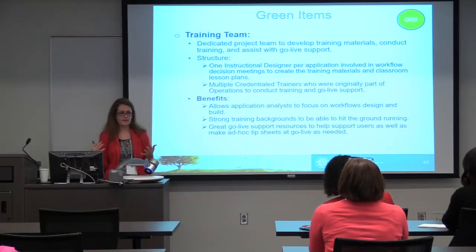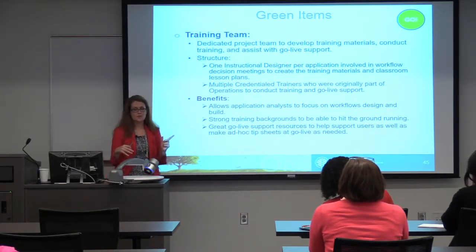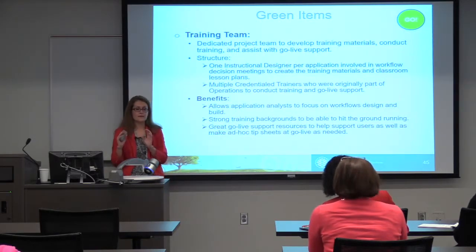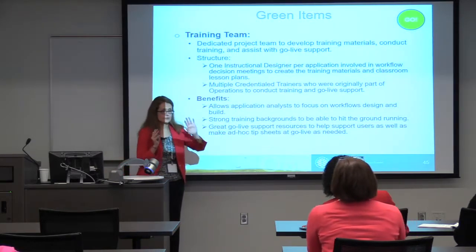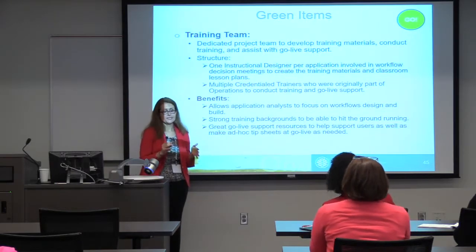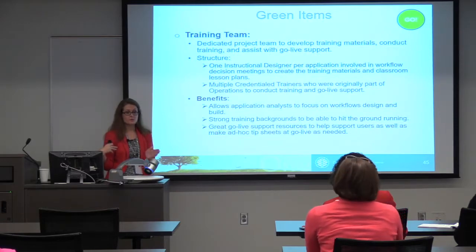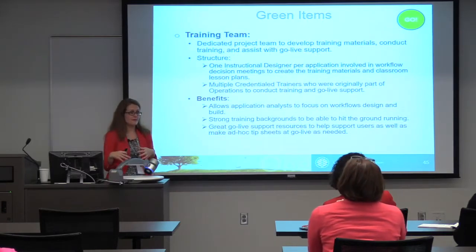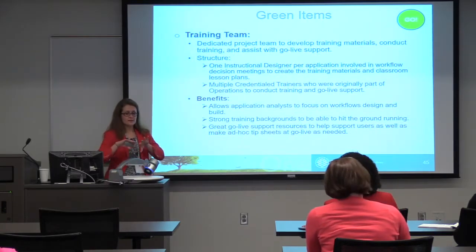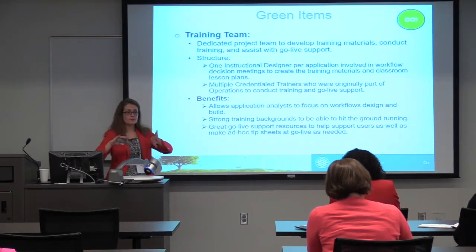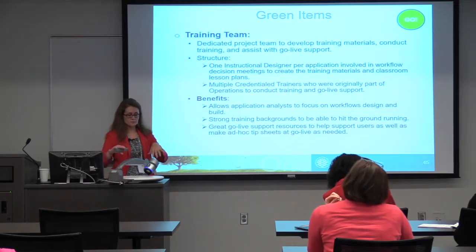What I think the biggest value of this is that, number one, those instructional designers were not analysts. They were not in the system building or developing anything. Their job was strictly training. So that allowed our analysts to focus on what their jobs were, which was to build applications. I feel like that separation of responsibilities really helped both sides be successful.